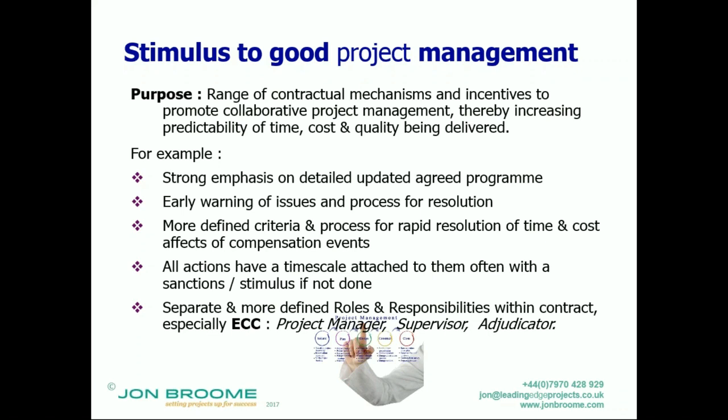Is it a claim or a compensation event in NEC speak? And how is it assessed in terms of quantum, time, and cost? Well, if you can nail that contractually, then you've overcome potentially a major source of dispute or disagreement. And all the time that people are focusing on the money and the extra time, they're not actually focusing on actually solving the issues which are causing that. All actions do have a timescale attached to them, often with a sanction or stimulus if not done.